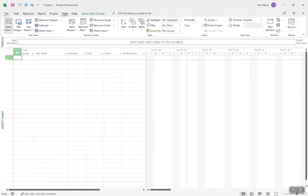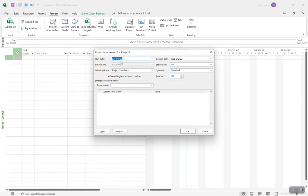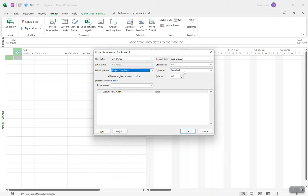Coming out of the backstage area, we now have Microsoft Project. I'm going to break this interface down simply. File is the backstage, same as any Office application. First, look at the Project ribbon — this is all the high-level information about the project. Project Information is the number one key thing: the project start date, and whether we schedule from the project start date. Generally, nine times out of ten that's what you want. The calendar you want to use — those two pieces of information are incredibly important.